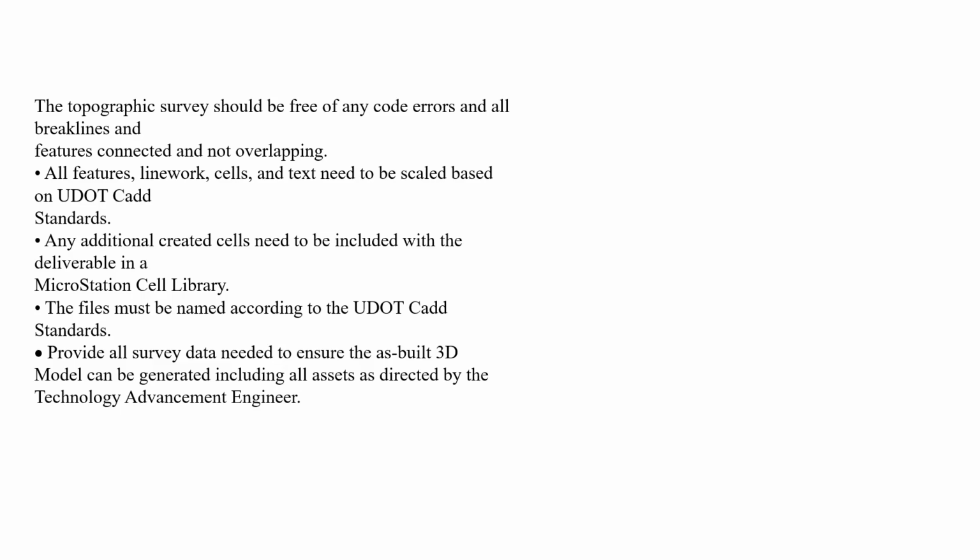All features, line work, cells, and text need to be scaled based to U.CAD standards. Any additional created cells need to be included with the deliverable in a MicroStation cell library, for example, if you use Bentley software. The files must be named according to standards and provide also the data needed to ensure the as-built 3D model can be generated, including all assets or as directed by the technology advanced engineering.